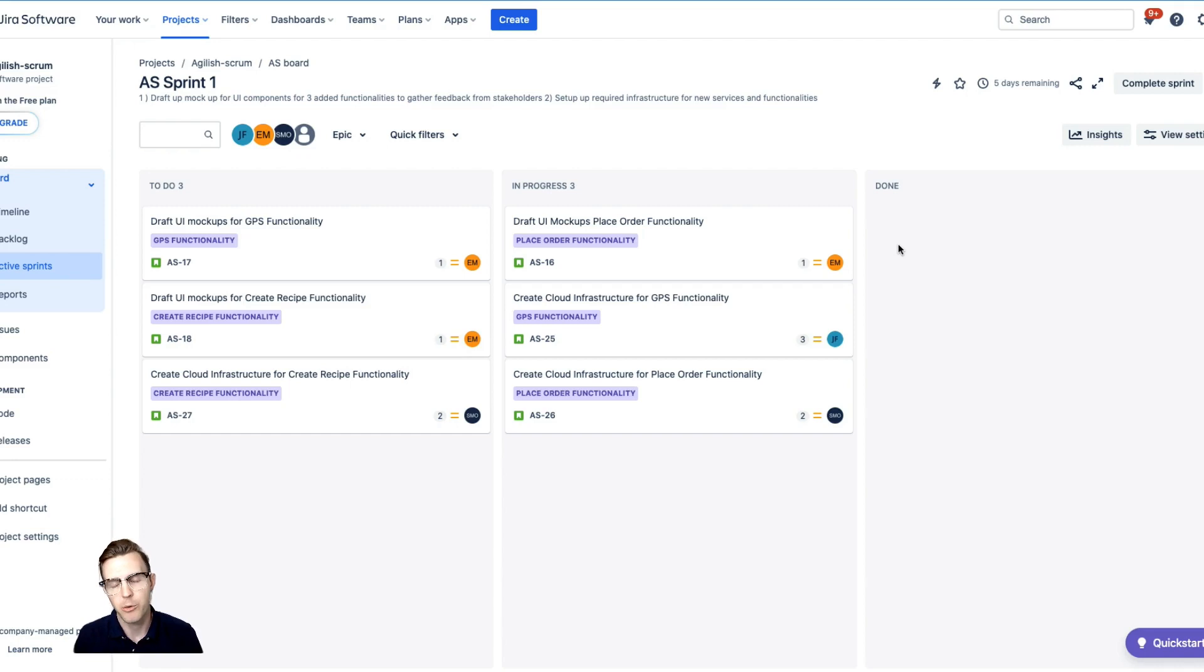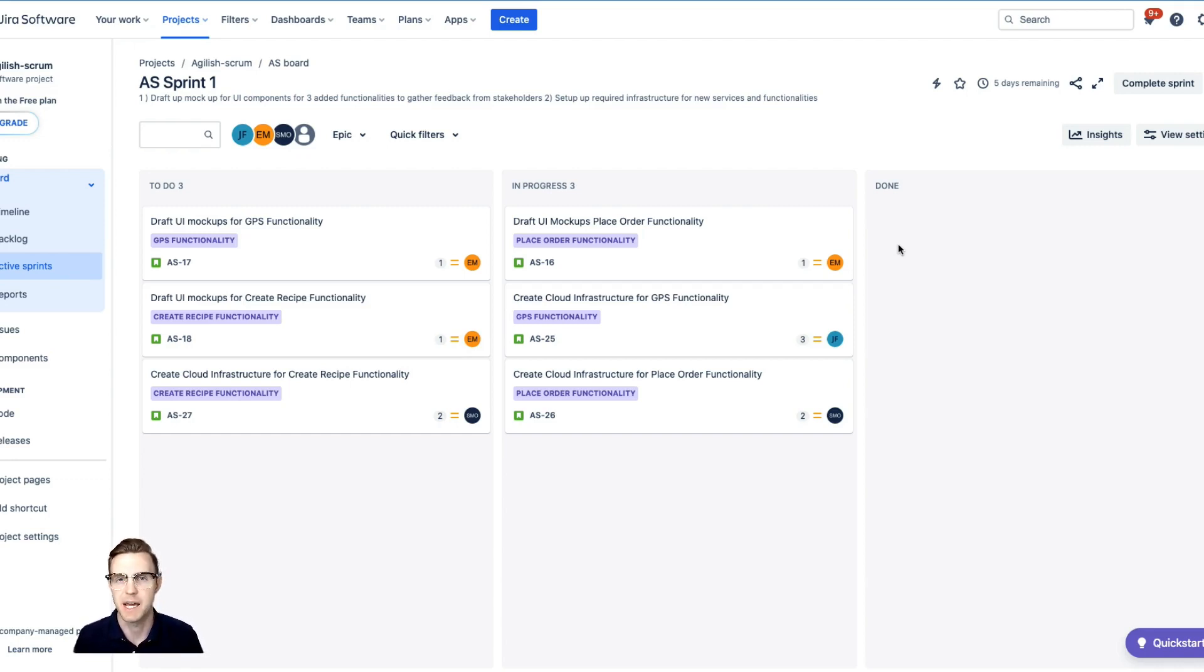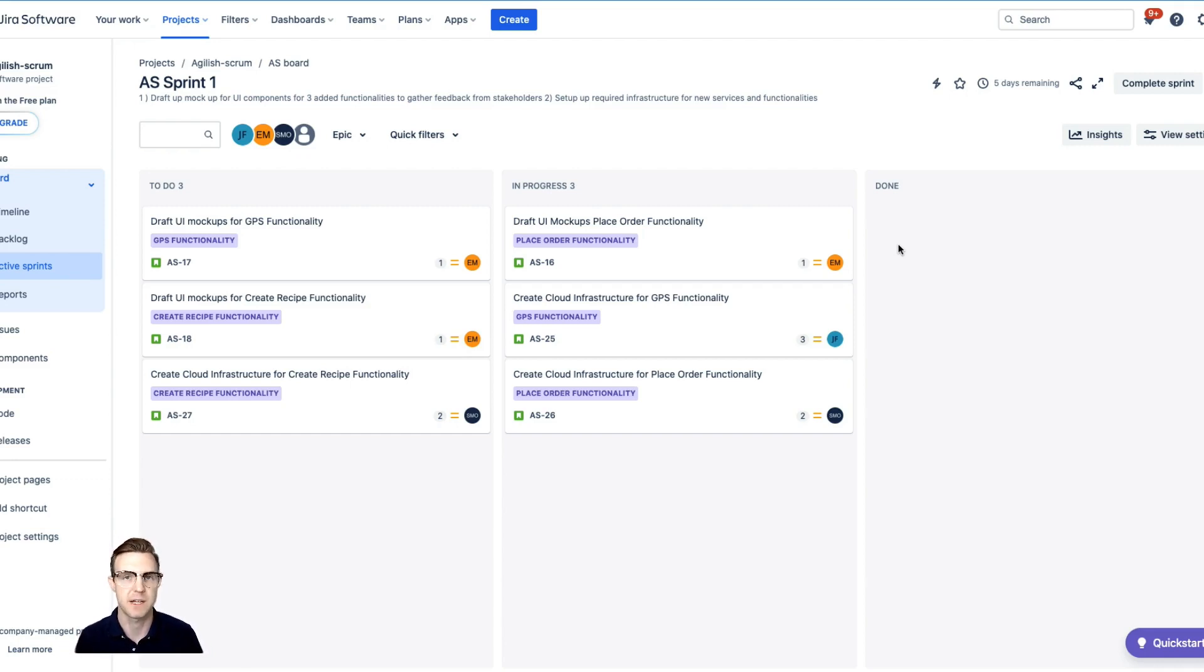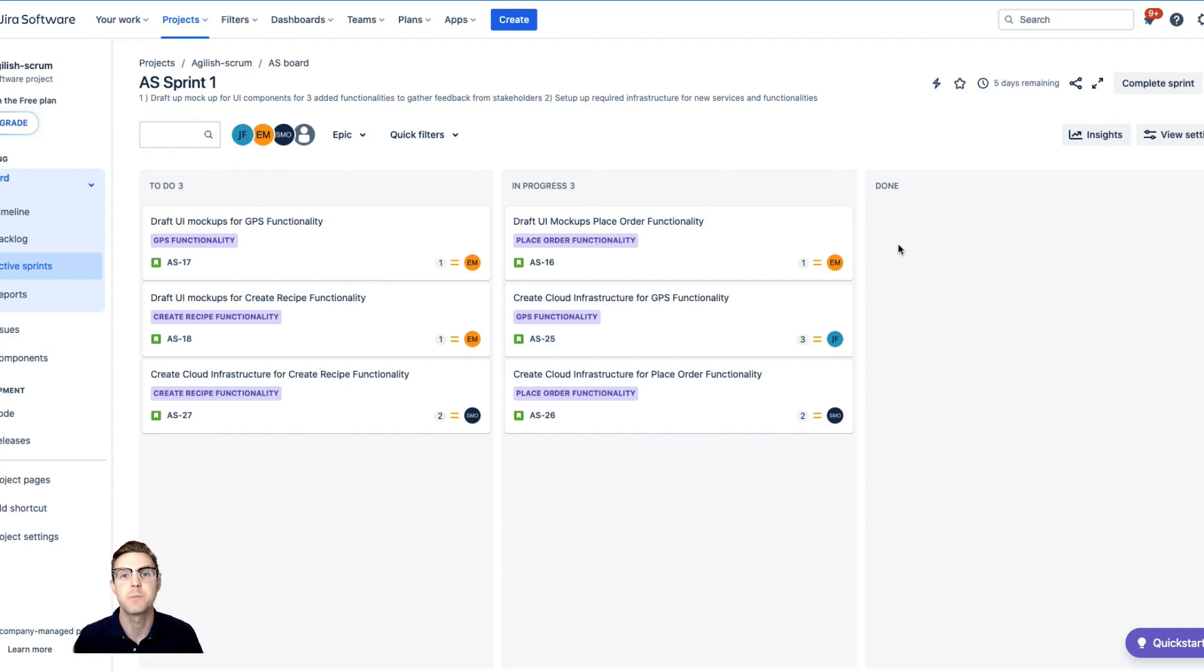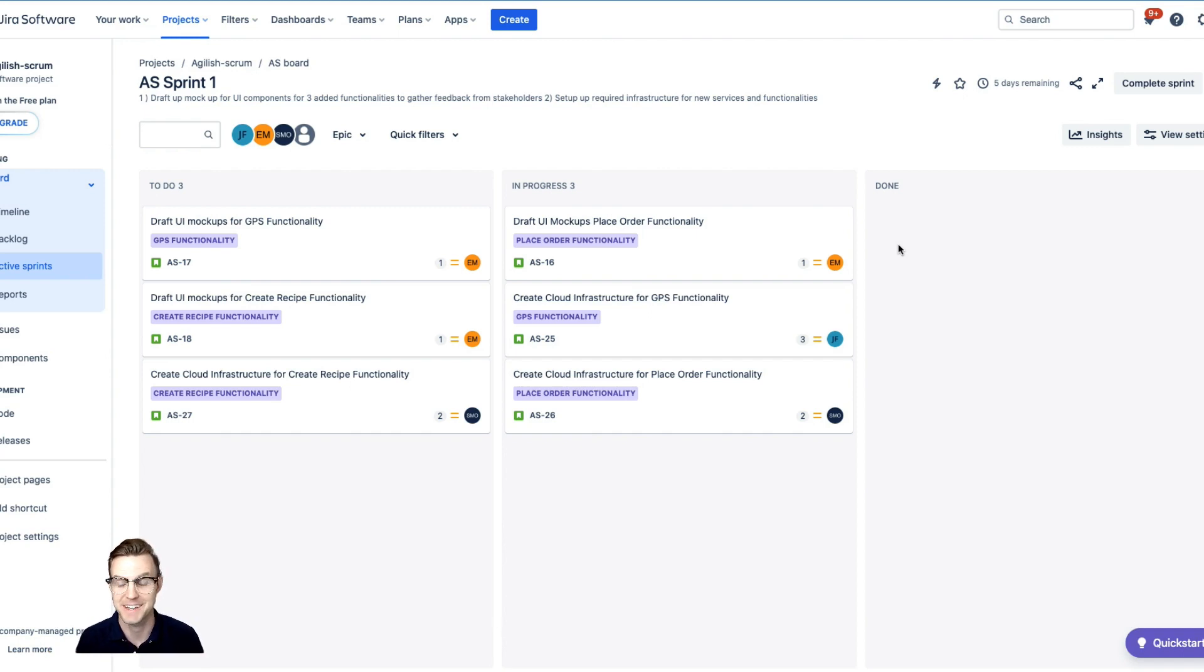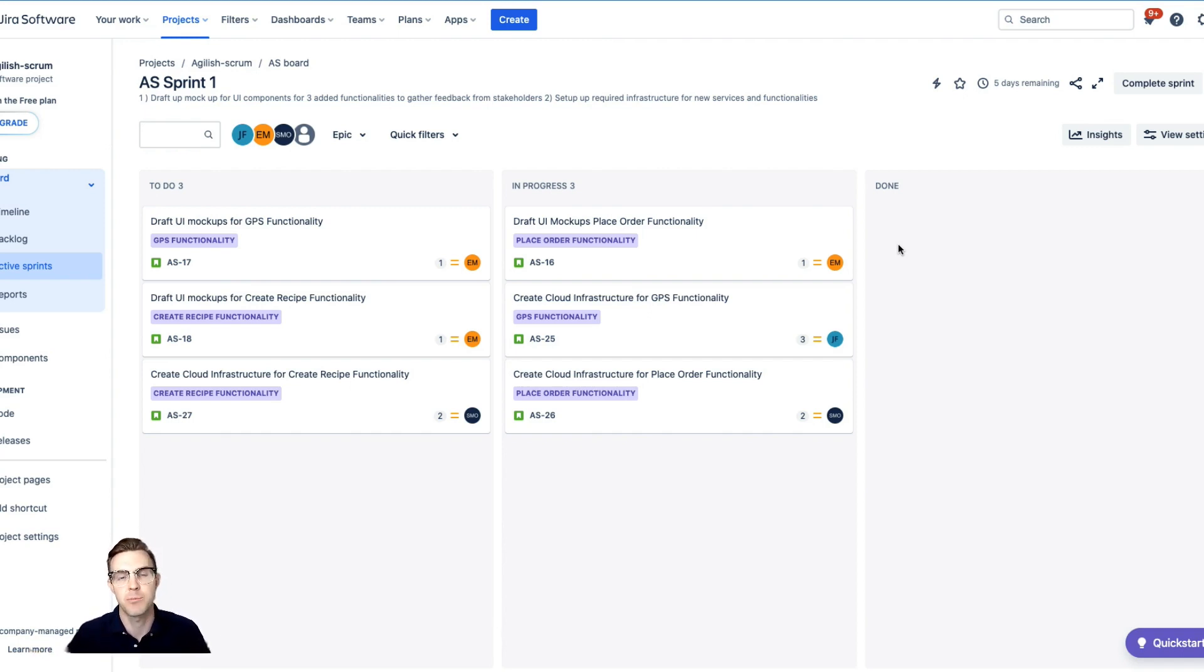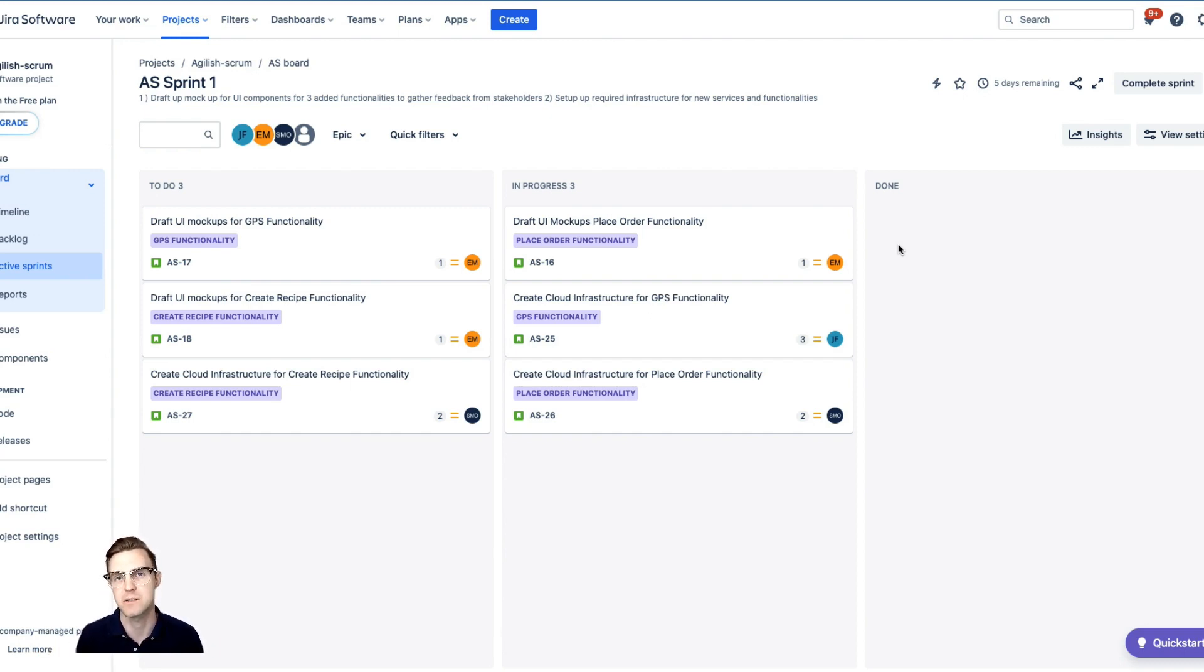The daily standup, another point here, going back to the daily standup on the same day as a demo. I'm assuming you're doing some kind of scrum here and you're demoing to stakeholders at the end of the sprint. Another technique here is the daily setup of the demo is used to prepare for that demo. Usually you don't ask about the progress of tickets or what's the status, because the sprint's pretty much over. So what I would use is use that as a preparation to making sure your team is prepared internally before going out to external stakeholders.